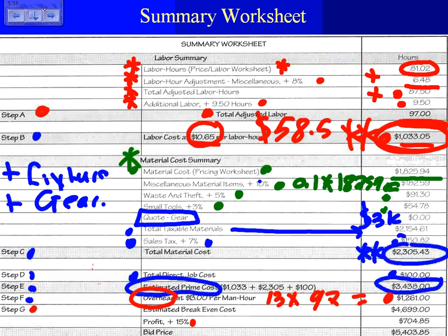If you are, here's where if you're a CA Electric, and you are the electrician who got paid this amount of dollar, the owner of the company, you and your electrician got paid, you recouped all your unemployment insurance and bond and all this good stuff, and you gave yourself zero overhead. That's okay. I mean, you're floating. So that's why overhead, they say 15%, add another 15% for overhead. That's when the market's really good. Now, if you can recoup 3 to 5%, you're good now.